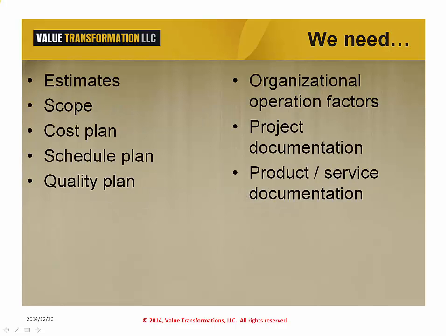We have some prerequisites for the risk identification. We will need to know about the project to understand what can go wrong. The project objectives, that is, our intentions for taking on this project, must be known in order to uncover what can be in the way of the objective, otherwise known as risk.